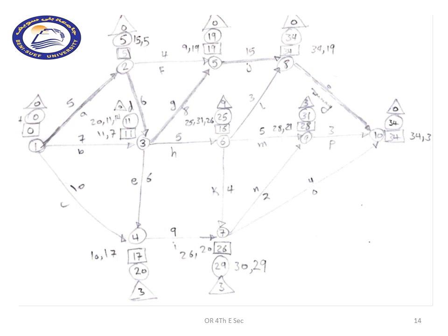Activity D will have 0 slack time at node 2 and 0 slack time at node 3. Activity G will have 0 slack time at node 3 and 0 slack time at node 5, etc., till the end of the network, as you can see.